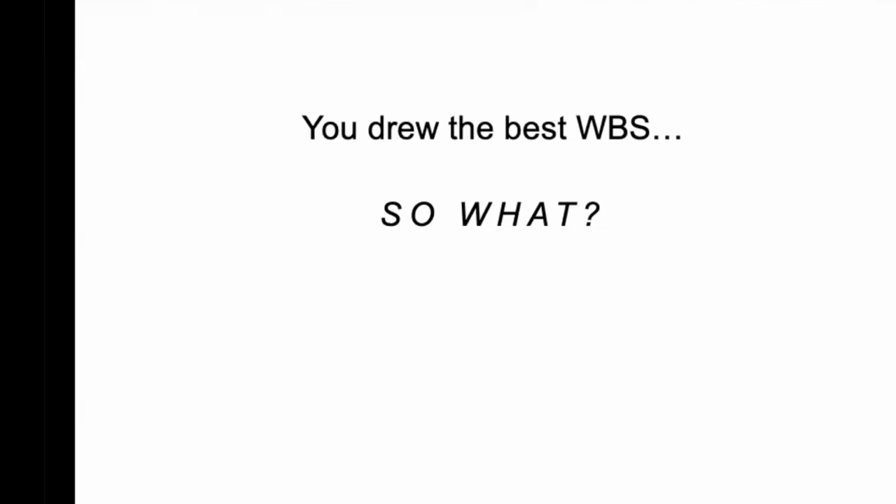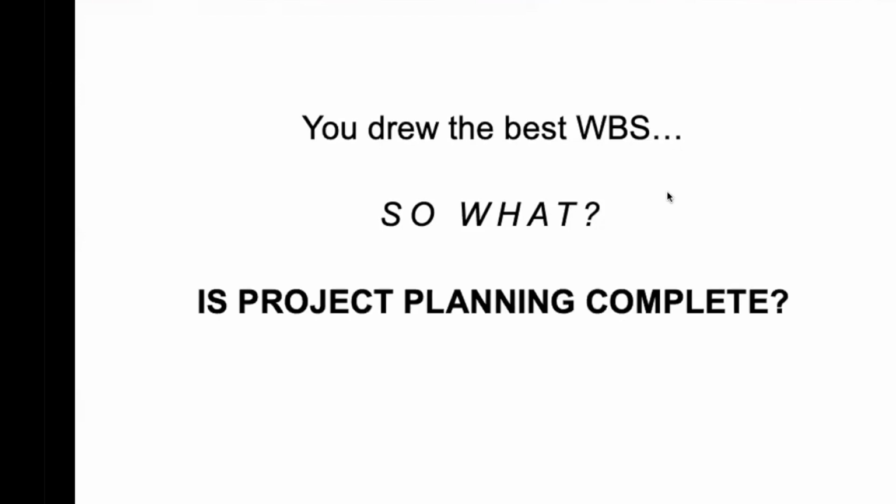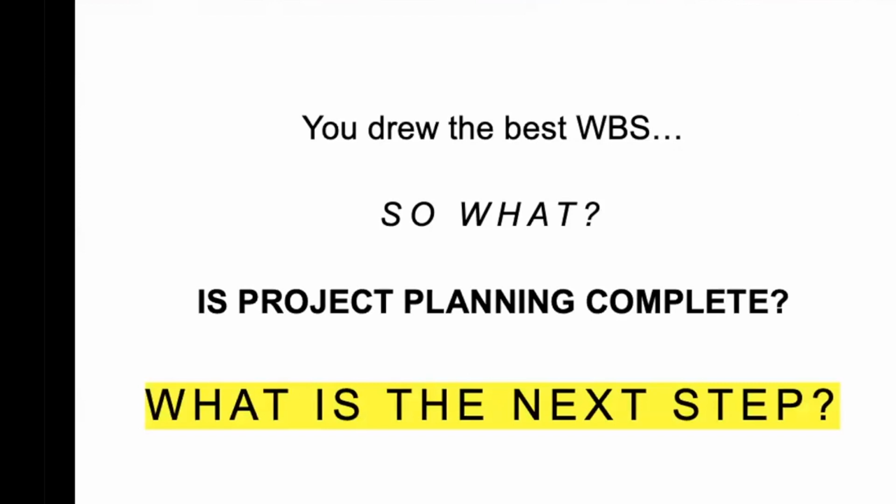So now you need, like John said, is your project planning complete? No, that's just the first step. Now you need sequential planning as well. Remember what I said about the WBS? It's not really hierarchy. The list doesn't say this will come before that. Other than waterfall, none of them tells which comes first, which comes next: time, sequential, functional, hardware. It's just a grouping of what's going to be done.